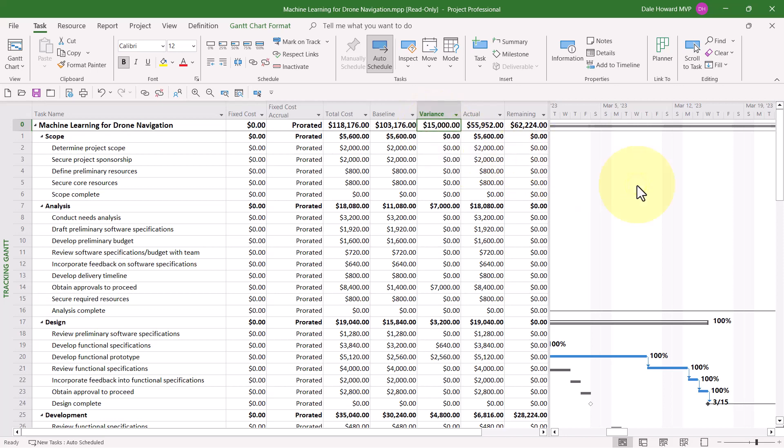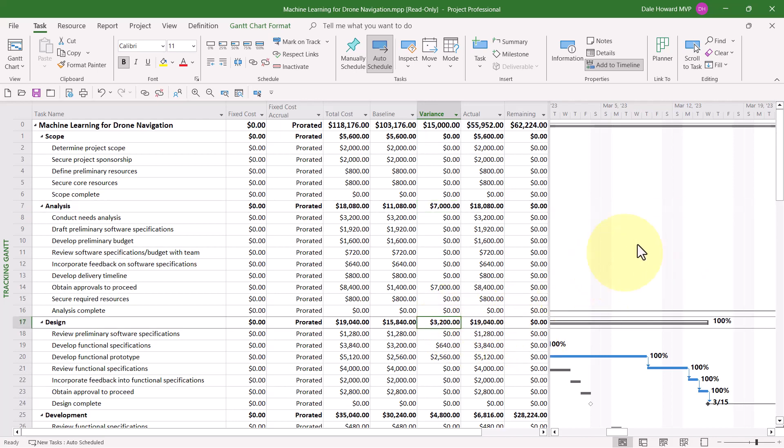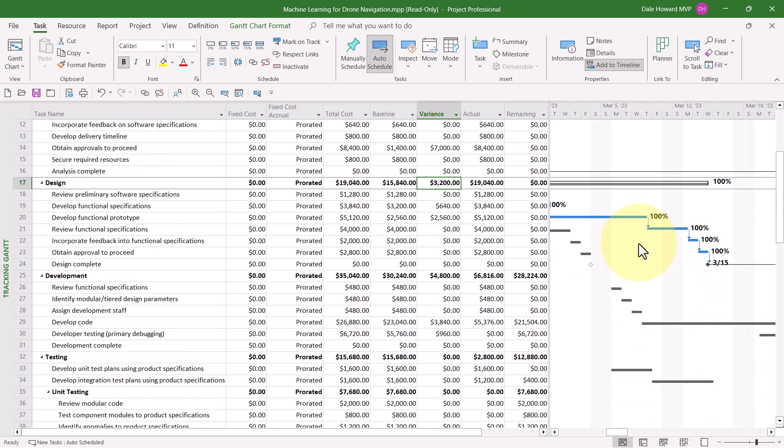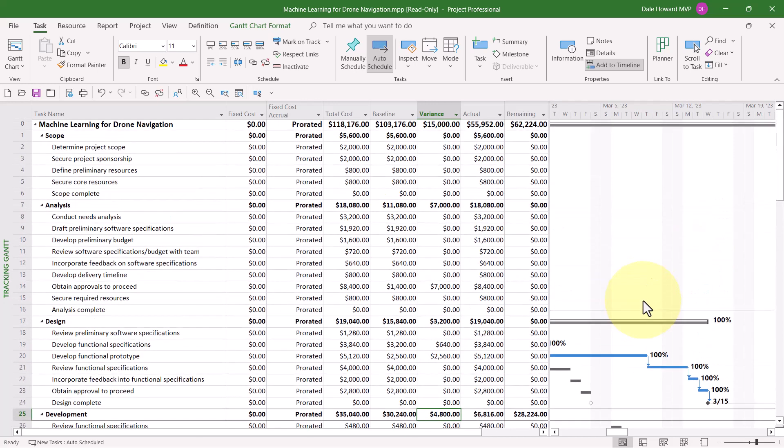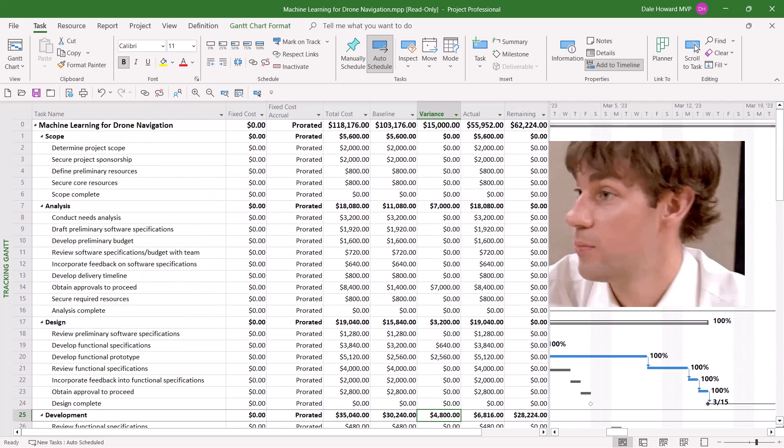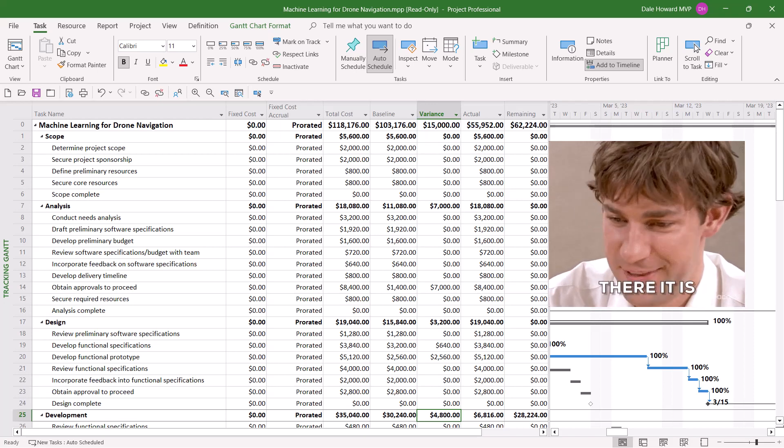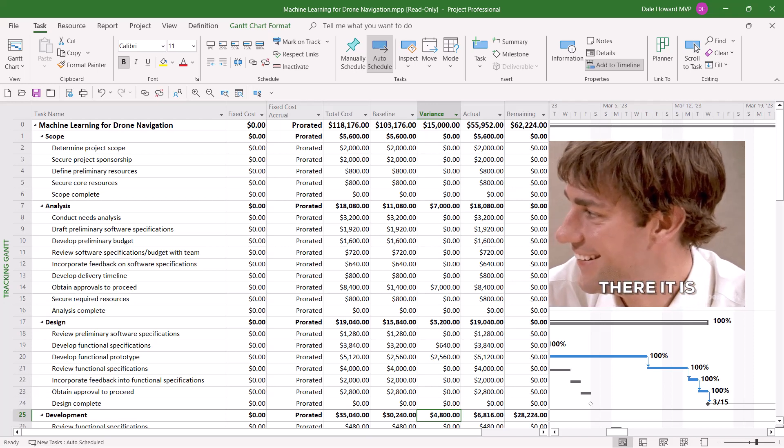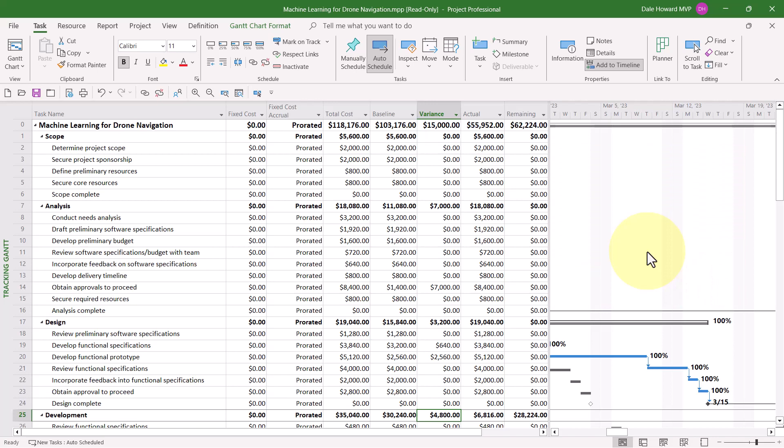The Scope section finished exactly on budget. The Analysis section went $7,000 over budget. The Design section went $3,200 over budget. And the Development section is currently $4,800 over budget. So, there's the four locations in which you can track and analyze Variance in your Microsoft Project Schedules.